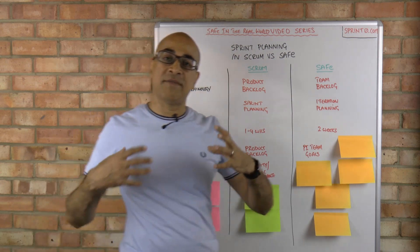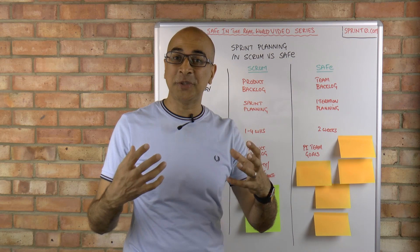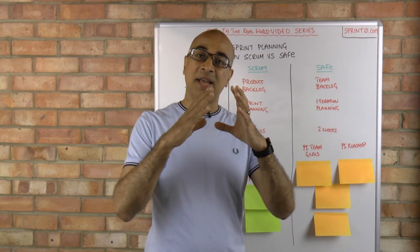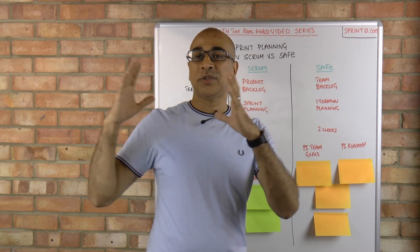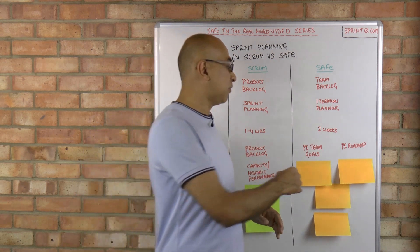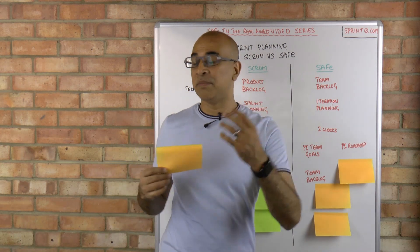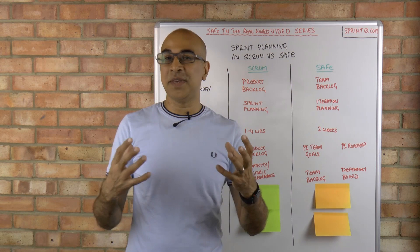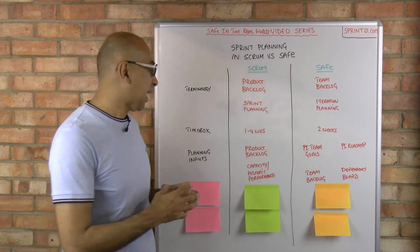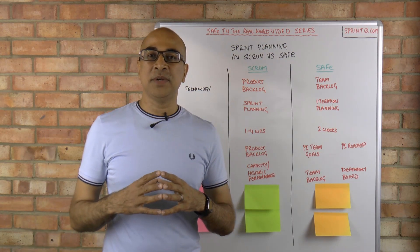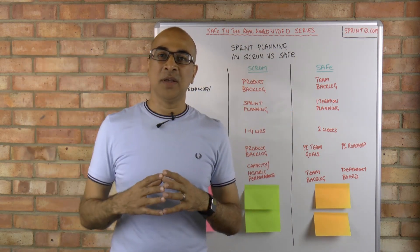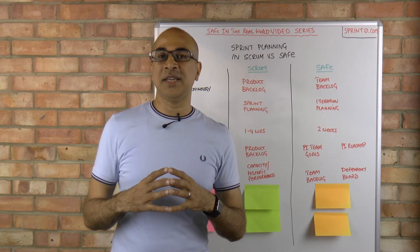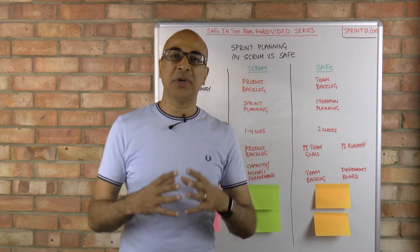In SAFe, the inputs are different. If you remember, we may have our PI planning event which will have produced PI team goals — that's an input. You have your roadmap, which is your emergent plan spanning four to six sprints depending on your program increment cadence. You have your team backlog, and finally your dependency board. When a team is working in Scrum they don't need to worry that much about what everybody else is doing, whereas in iteration planning within SAFe there needs to be much more focus on what the other teams are doing.